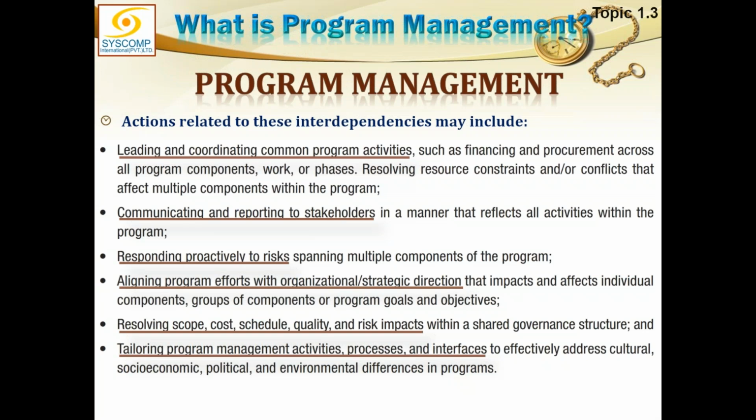Then responding proactively to risks spanning multiple components of the program. So the risk management also needs to be at the program level. Well, I'm not saying that there will be no stakeholder management or risk management at project level. The project level responsibilities remain there. But if there are common stakeholders or common risks, those common risks and common stakeholders will be dealt with at the program level,